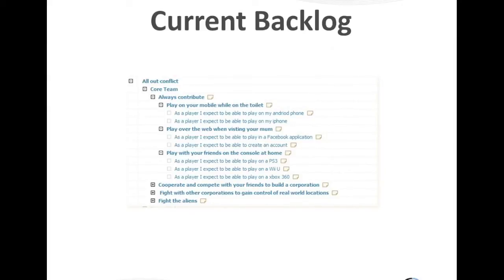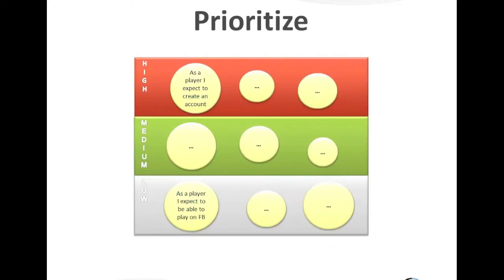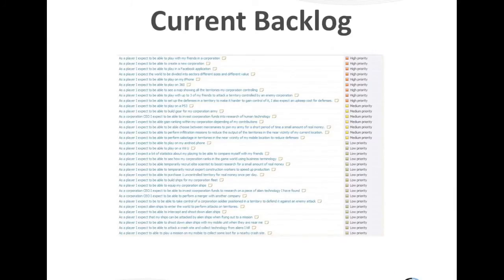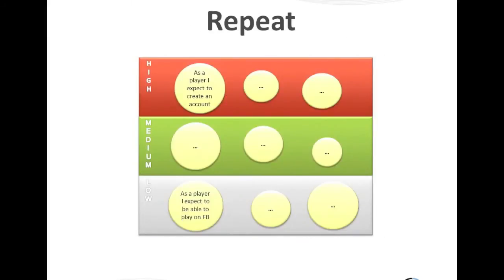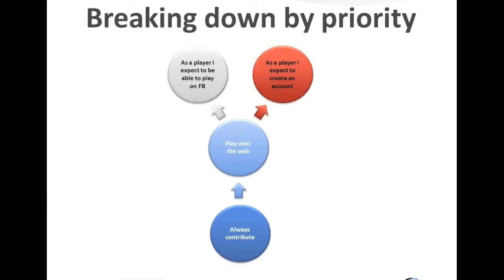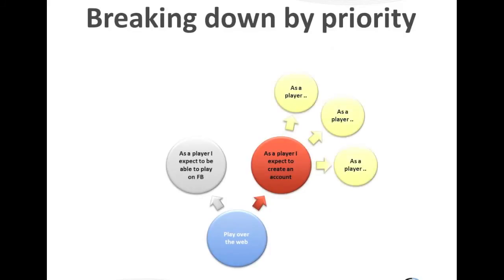We keep adding more information to the backlog, and now it's time to start prioritizing what is most important. We said that 'as a player I expect to create an account' is a high-priority item, whereas the mechanics of a Facebook application are not that important right now. We can look at the backlog in a prioritized manner and start attacking it. We add details to account creation while leaving the Facebook creation for later, until we get there.